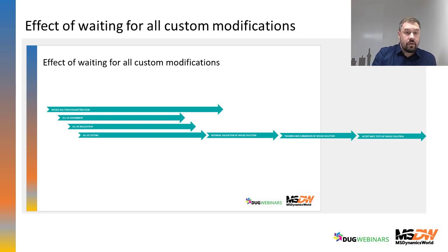Usually you want from them to make everything, but usually they need to wait for the previous processes which are logically in the prior sequence, and when the project develops and the processes are done, the project can change or the scope can change, or some ideas about how the later process should be solved can change.